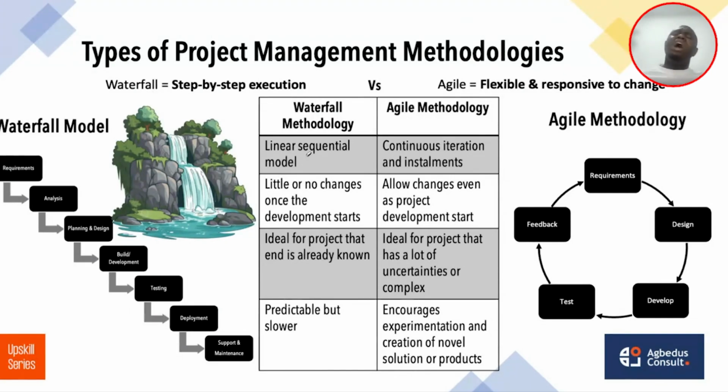No, we have to do it in sequence, and the last people will be the roofing people. The interior deco people will also come last. They cannot come and say, oh, I want to do the interior design before you finish the house. No, it moves in that order, okay?